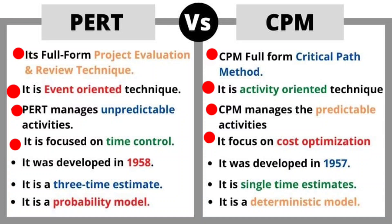In the fifth point, PERT was developed in 1958 whereas CPM was developed in 1957. In the sixth point, PERT uses three time estimates and CPM uses a single time estimate.